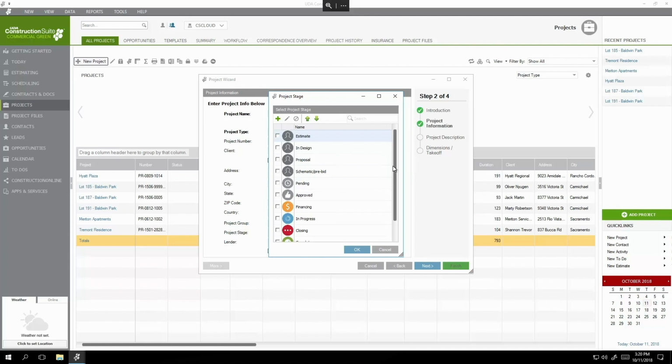If they say that they don't want to spend more than $200,000, I say good luck finding a builder. If they say that they've got a budget of $1.5 million, maybe then we'll talk. So that's where I start. Then we step into design. Then we get into proposal. We'll do a pre-bid section. That's where I start to send out the bids for everybody involved.